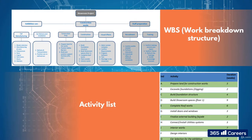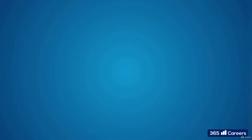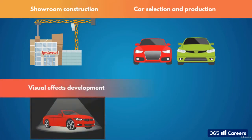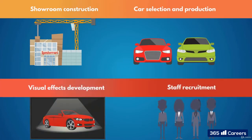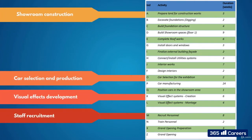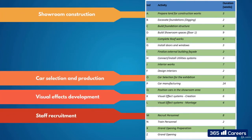We have our four work streams: showroom construction, car selection and production, visual effects development, and staff recruitment and preparation. Each stream can be executed in parallel, starting with A, O, K, and M respectively.